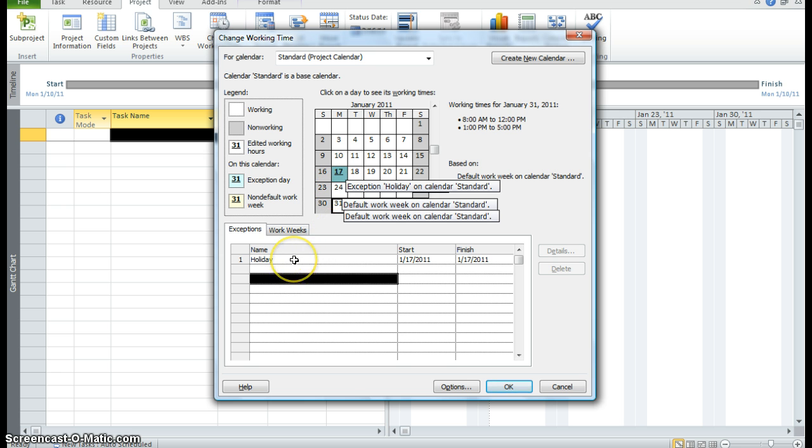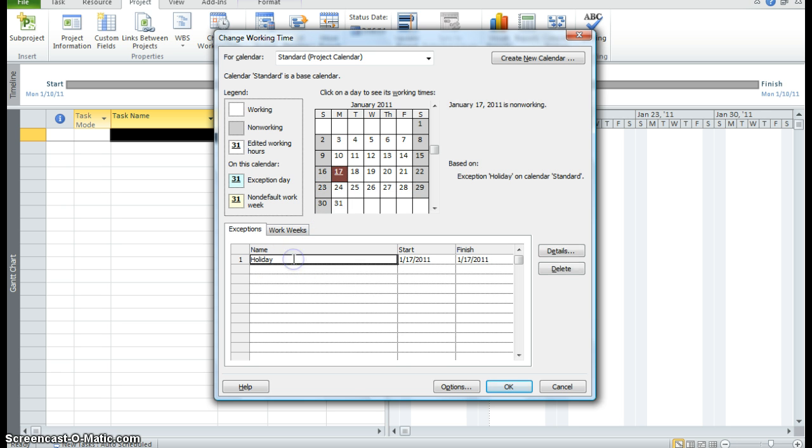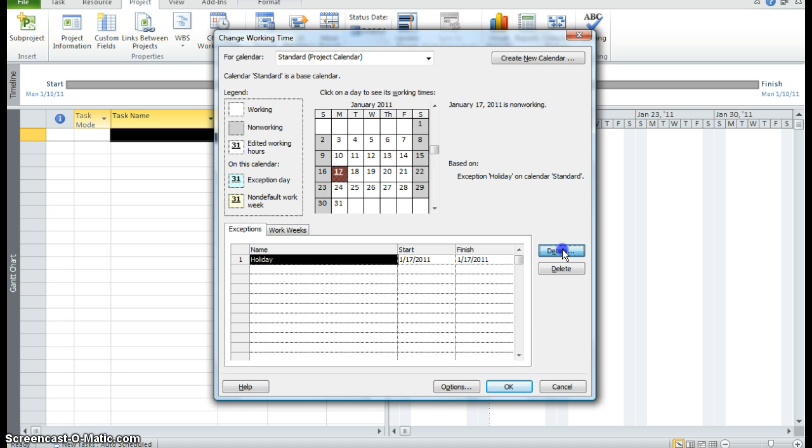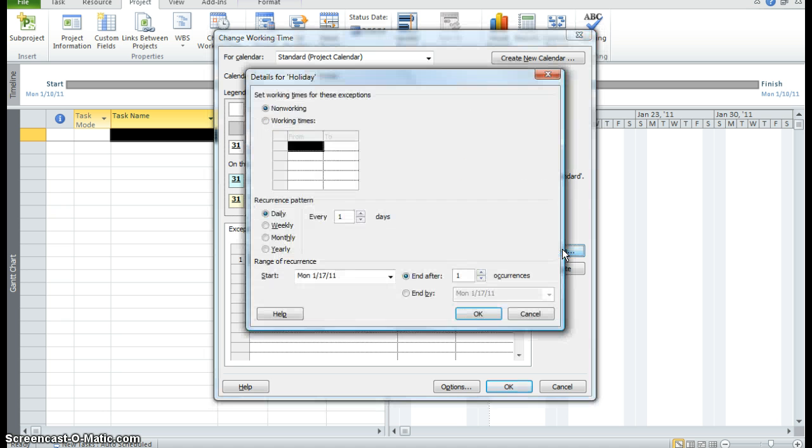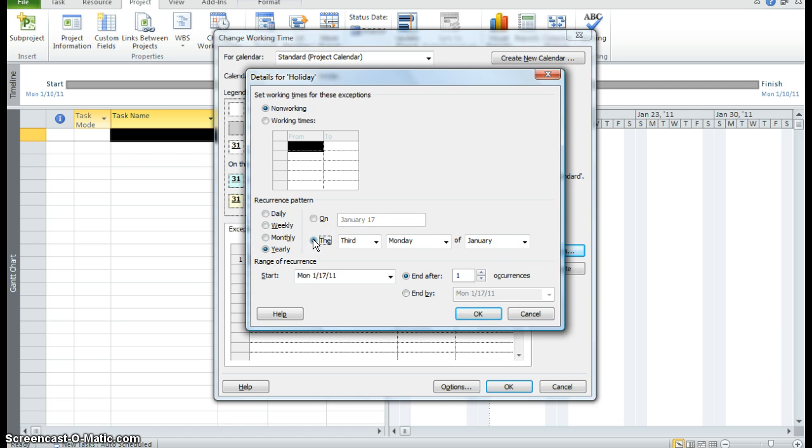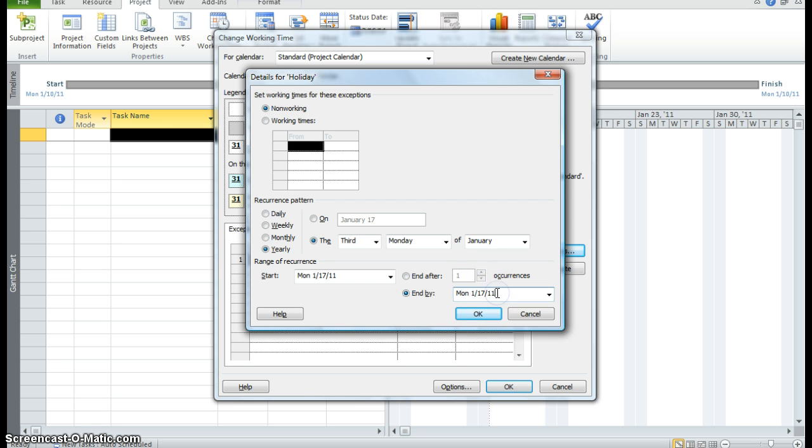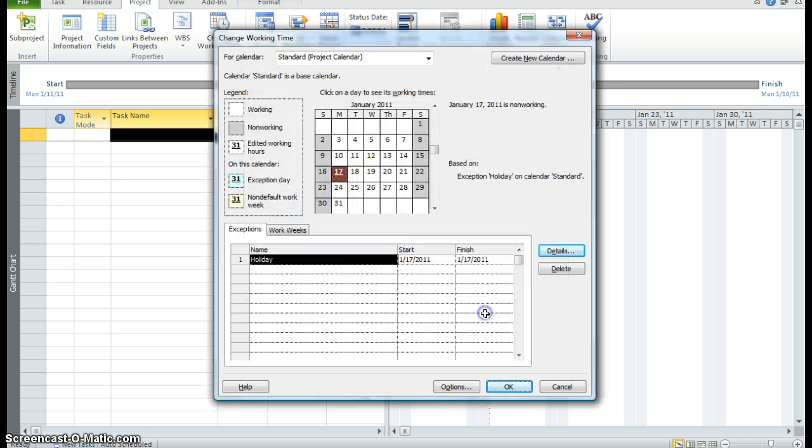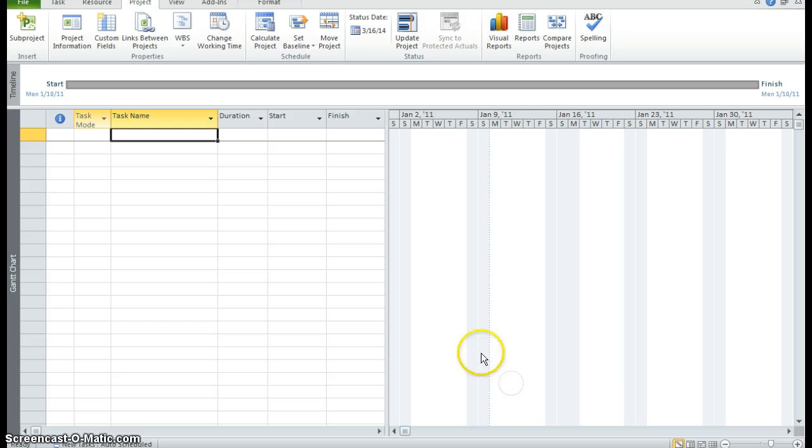Now I want to make sure that this holiday is carried through for a few years. So I'm going to click back into this field where the holiday is. Click on the details button. A dialog box will appear. Recurrence pattern. It's yearly. It's every third Monday in January. And I want to make sure this goes out to at least 2018. So I'm going to put in 2018 and click OK. And I'm going to click OK to save all my changes.